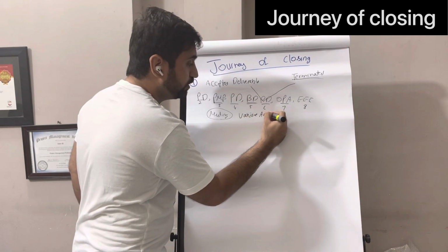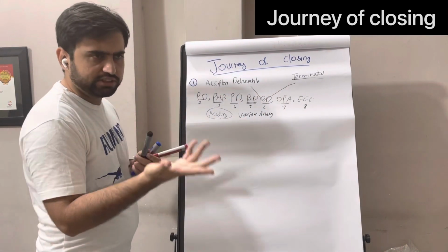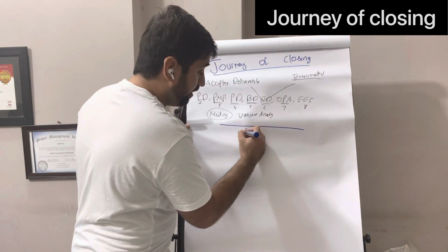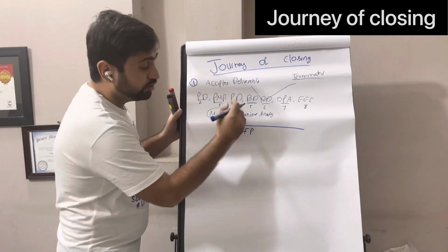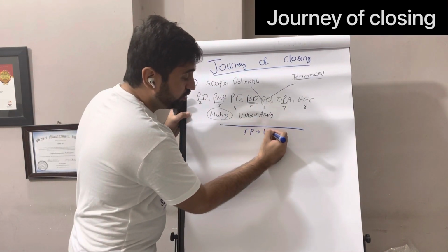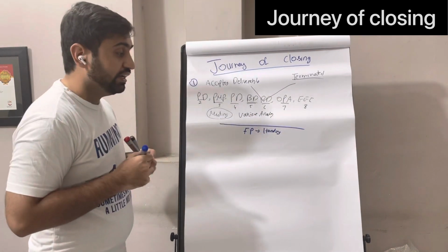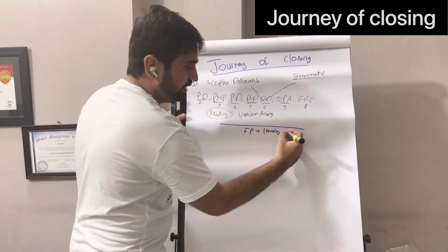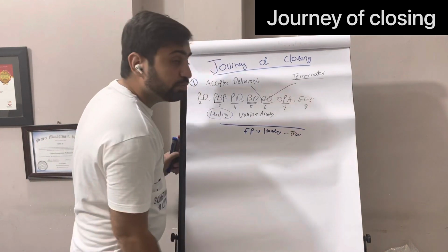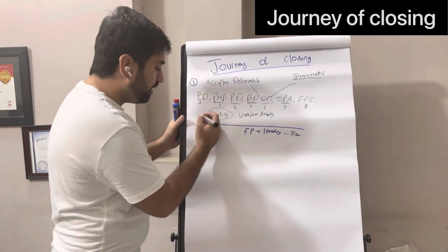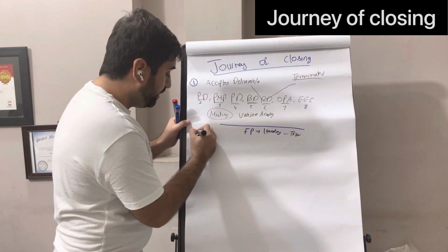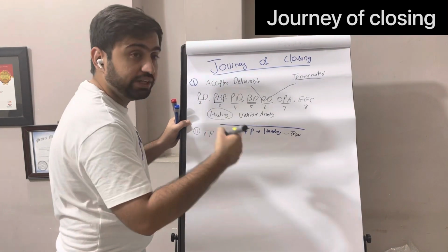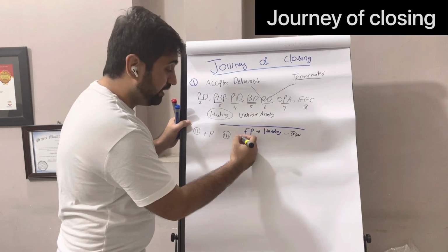You perform all those things, and if the project is approved, you get the final product. The first step of closing is the final product. You get the final product, and you start handing it over to the client. Hey, this is my final product. Like, the transition process is there. The transition process has started. In the meantime, the final report is being written. Project documents start being updated. You start writing lessons learned.